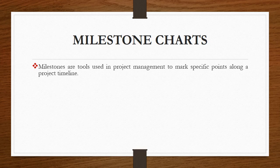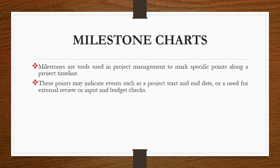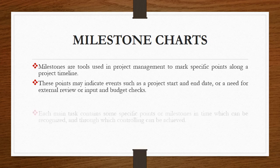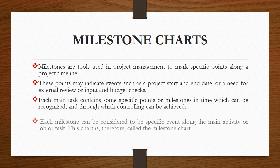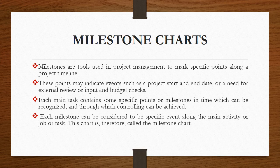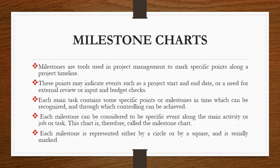The second method of scheduling is milestone charts. Milestones are tools used in project management to mark specific points along a project timeline. These points may indicate events such as project start and end date or a need for external review or input and budget checks. Each main task contains some specific points or milestones in time which can be recognized and through which controlling can be achieved. Each milestone can be considered to be a specific event along the main activity or job or task. This chart is therefore called milestone chart. Each milestone is represented either by a circle or by a square and is serially marked. So milestone chart is a chart which is made up of these milestones. Usually a milestone is in the shape of a circle or a square.